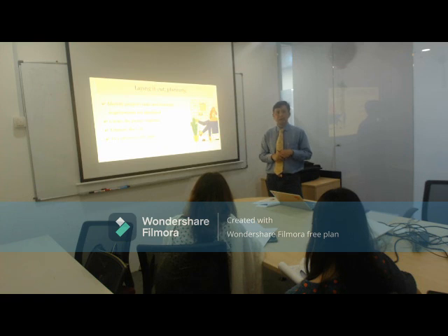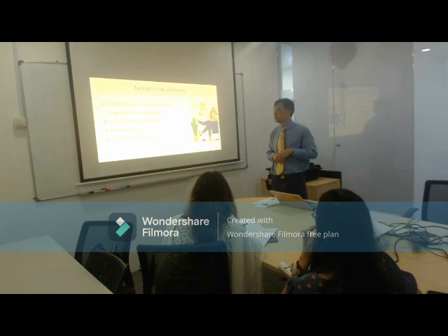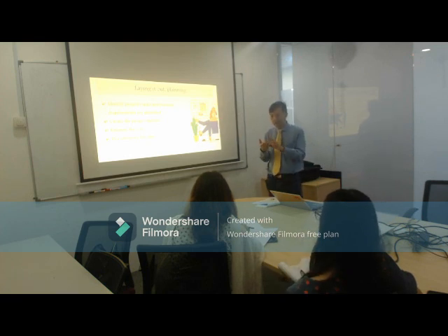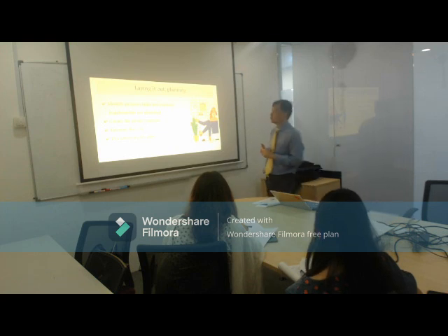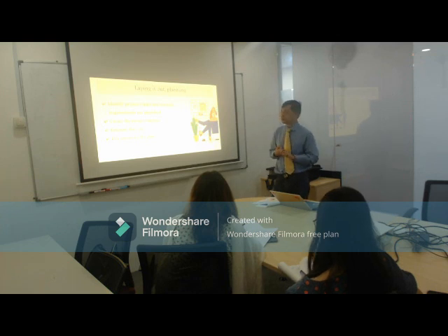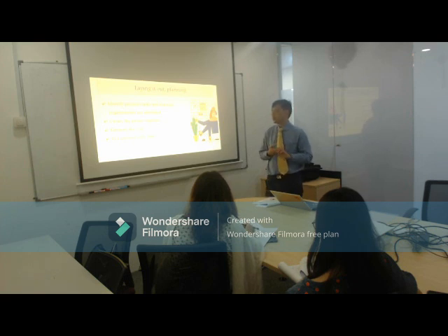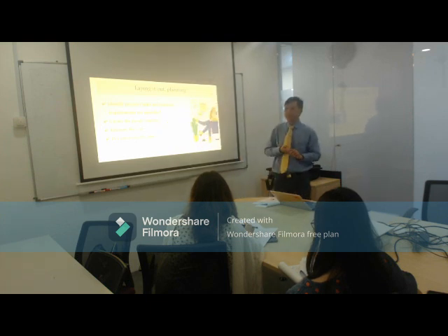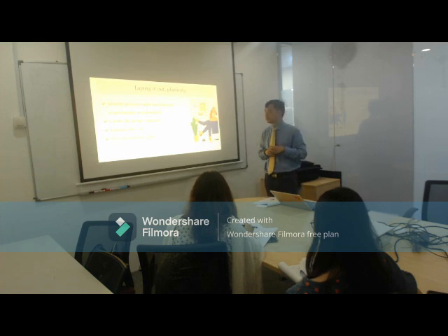If you're doing the training in a hotel, for example, then you may have to book a hotel, so the cost is there. Secondly, the cost in the sense of time. You may also have to worry about when we are going to get these things all done. That means we have to arrange everybody, say, oh, after work you all must go for training. After work, yeah? So those are the costs. And we may have to spend extra on the software. Why? The training consultants who are providing the software need to be able to provide the training, so we need to include that in the cost.